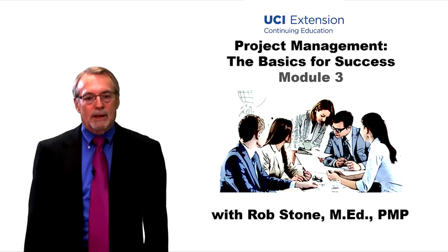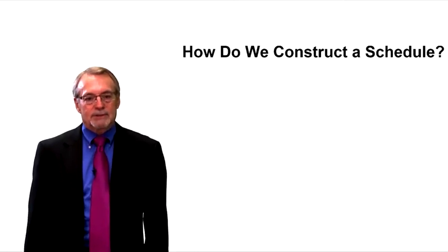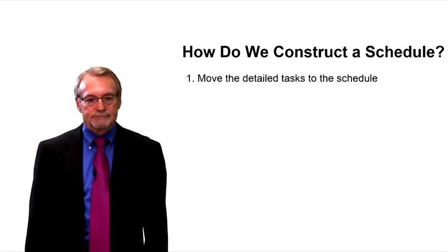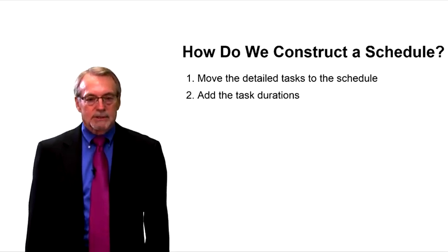Welcome back, and let's take a look at how we actually construct a schedule. What we're going to do first is move all the detailed tasks onto the project schedule. Where do they come from? They come from the WBS. We're going to add task durations. So specific task durations, we're going to put those on the schedule.